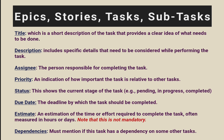Title: a short description of the task that provides a clear idea of what needs to be done. Description: includes specific details that need to be considered while performing the task. Assignee: the person responsible for completion of the task. Priority: indicates the urgency or importance of the task relative to other tasks. Status: shows the current stage of the task — for example, pending, in progress, to do, completed, etc.